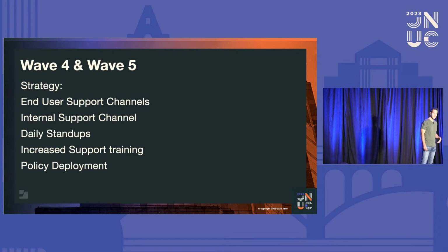So wave 4 and 5, these waves are combined to just the size of wave 5, which was 14 devices. The only thing to really highlight here was our first large change in our communication strategy. For each wave before wave 5, we were doing individual Slack channels. That meant we just added people to the Slack channels, and they knew that this channel was for Jamf Connect issues. However, when you get to 304 devices, or 304 users in a wave, those channels become kind of useless